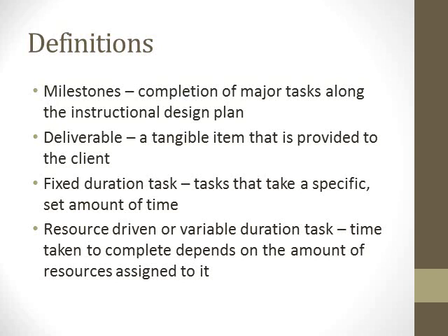And here are just some major definitions that I'll probably be throwing out that you need to know. Milestones is just the completion of major tasks along the instructional design plan. Just like you have mile markers on the highway to tell you how far you're going or how far along the road you are, you have milestones. It might be when the task analysis is complete or when the first draft of the instructional materials are done. Those are major milestones that usually have dates associated with them, so you can tell whether or not you're on track for completion.